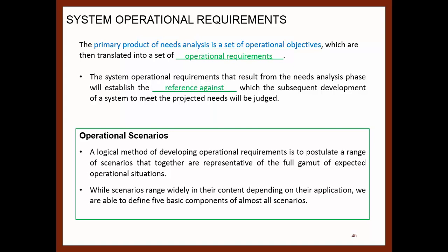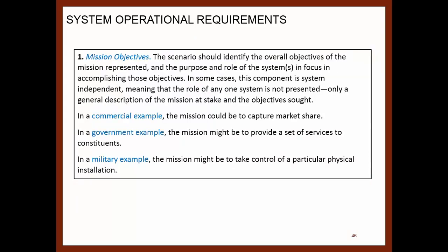Well, scenarios range widely in their content depending on the application. We are able to define 5 basic components of almost all scenarios. 1. The mission objectives. The scenario should identify the overall objectives of the mission represented and the purpose and role of the system in focusing and accomplishing those objectives.